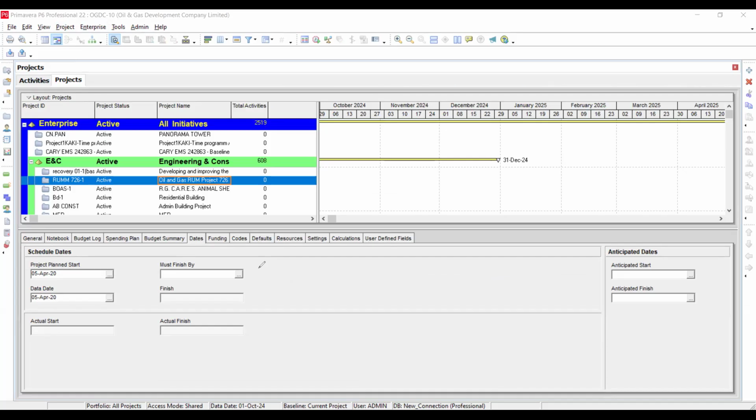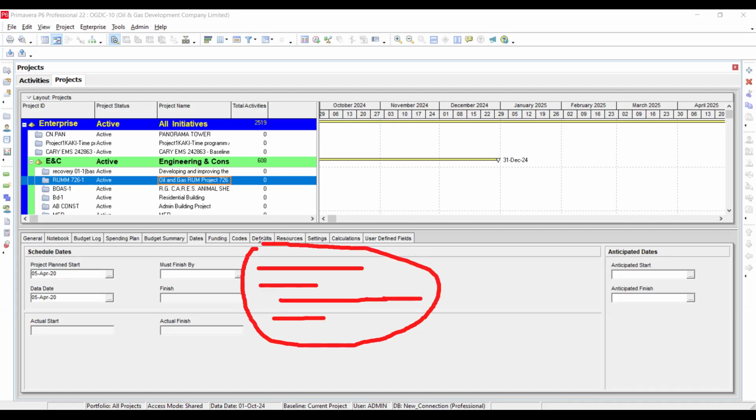So Primavera P6's critical path method definition is something else. Like if there is one path like this, one path like this, one like this, and one like this, Primavera P6 by its default assessment finds that this is the longest path and this is the critical path, because this is the longest path. You understand what I mean? That is the simple way. I will explain it again.